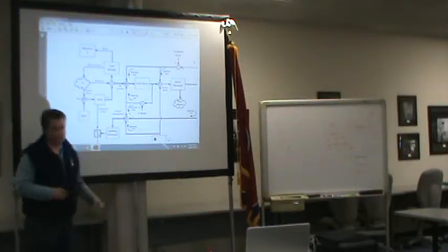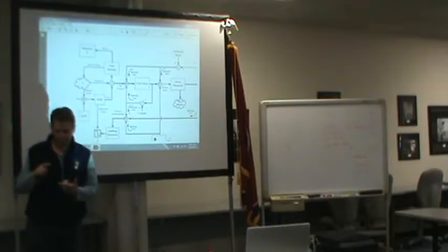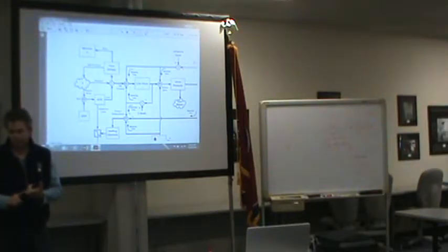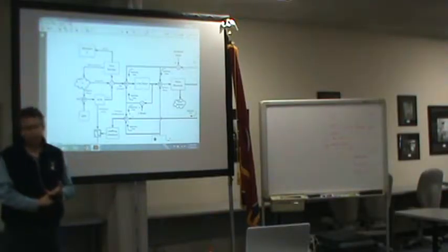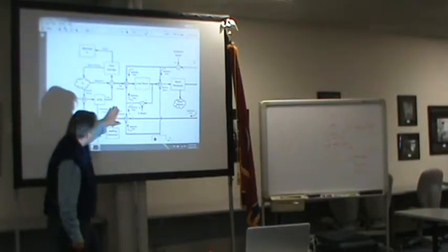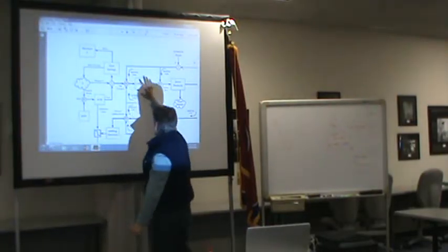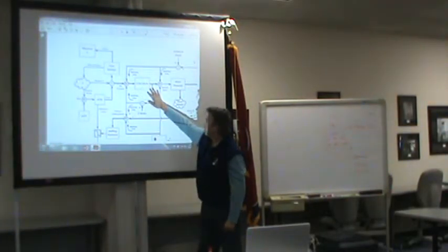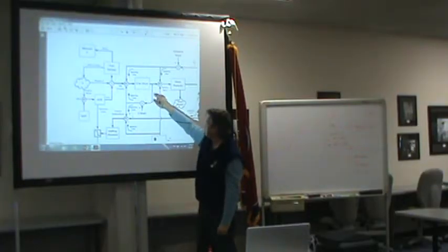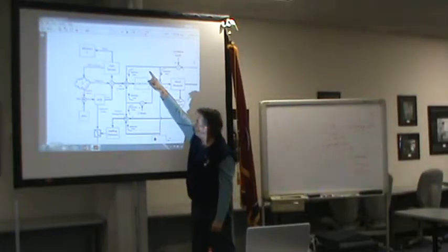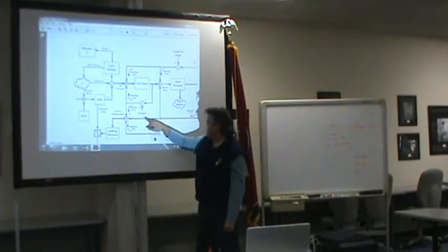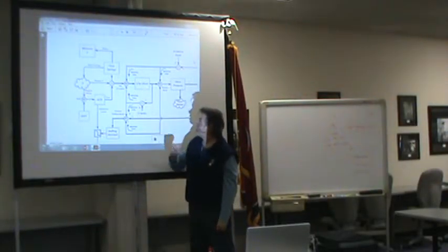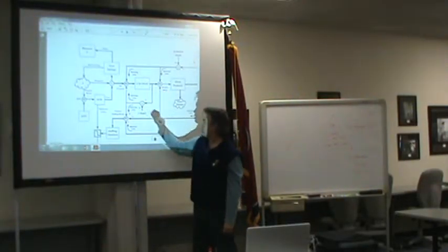And a program manager comes in here and says, okay, here's so much money. I have a quality I need to get out of it. I have a production schedule I need to get out of it. And I can't spend any more money than this, okay? So you have a workforce that's coming in here, and they're producing to what the program needs. And you can see I mapped out several different loops here. When money comes out of here, we spent some of it, so there's a feedback to the program manager, so he knows how much has been spent. They have a goal for the money, so there's also that balancing loop here. So there's knowledge as well as the balance.